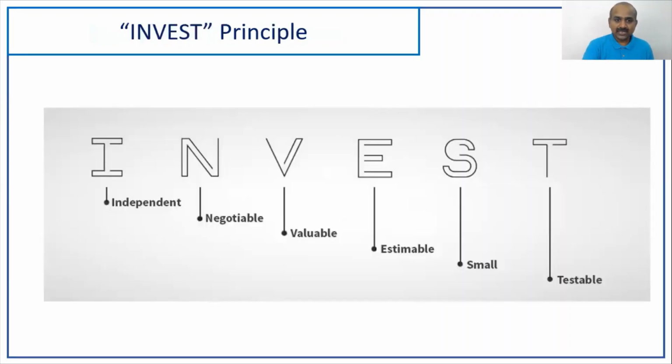For the checklist, we are giving a broad framework called INVEST. One is that stories should be independent. There are occasions wherein 40 story points worth of work, 13 story points worth of work, or 20 story points worth of work are given to the team, and they can't complete those stories in one sprint itself. Most probably the story is not broken down to independent levels.